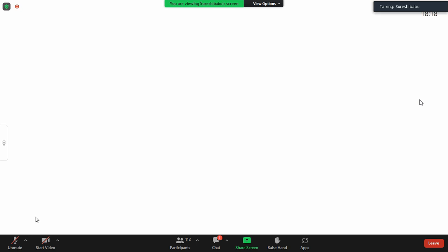Everything is coded. All 40 requirements are coded. Now go for the next step, testing. Everything tested. In one shot, we deliver the project to the client. Such kind of development models are called sequential models. Best suitable for making small size of applications.